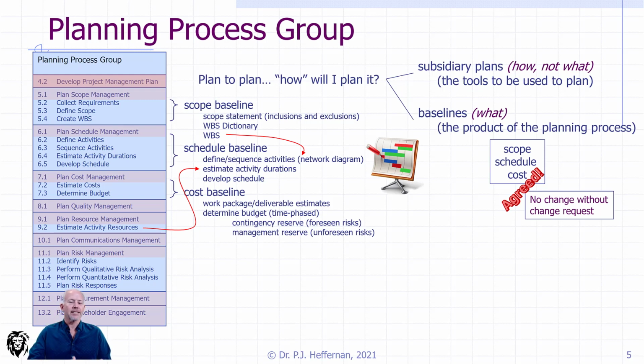And so you can't separate cost from duration. They have to be considered at the same time, certainly in my sector. And from that, you can start to get your cost per activity. And from the cost per activity, you can start to develop your budget timeline or your cash flow as it flows out over the timeline for the project. And this is the basis upon which we start to build the budget.